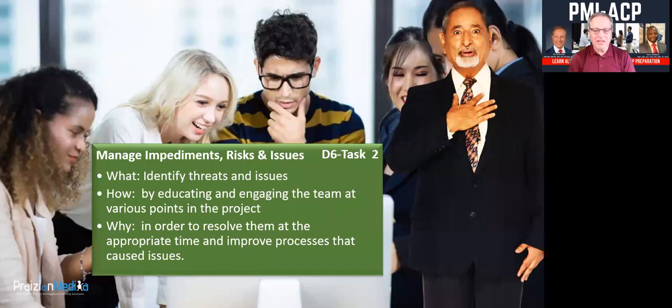And when we're learning new things, it's not just about upskilling the individual. It's also reducing risk on a project. One of the reasons that reduces risk is because now we've got more people that can do the same thing. I don't have that individual person as the only person that can do something. Now I've got a whole team that at least understands it and could try to do it. Maybe not as well as the primary subject matter expert, but at least they could do it. So think about how that helps you reduce risk on your overall project. Now you can do some self-leveling in the team and spread the workload around, not always going to the one person, right, Phill?